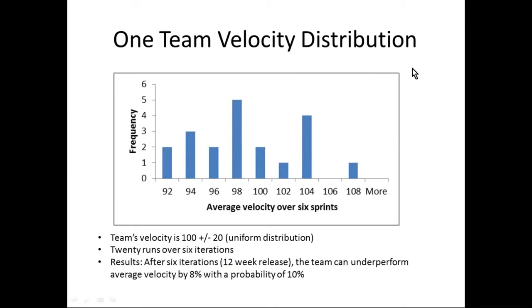Here's a very simple example. We're going to model a team that has a velocity of 100 plus or minus 20 points, so they range in velocity between 80 and 120. We want to know their average velocity over six sprints with two-week sprints — six iterations means a 12-week release, a pretty standard quarterly release. The average case approach says we'll complete 600 points after those six sprints, but since velocity is varying between 80 and 120, approximately 50% of the time we're going to finish fewer than 600 points.